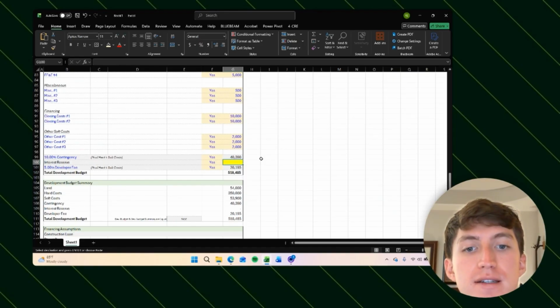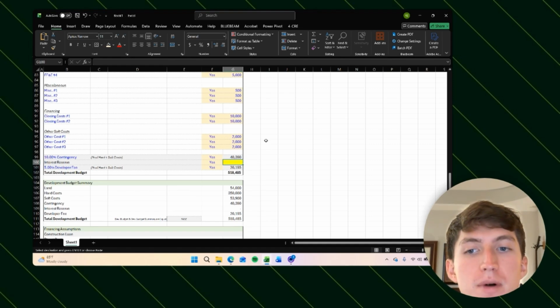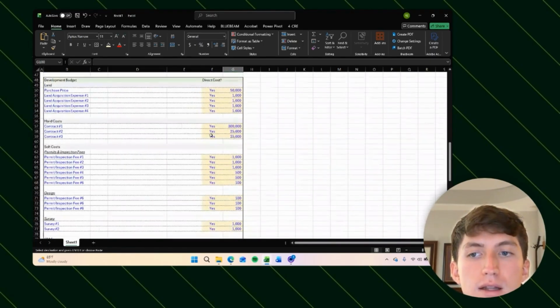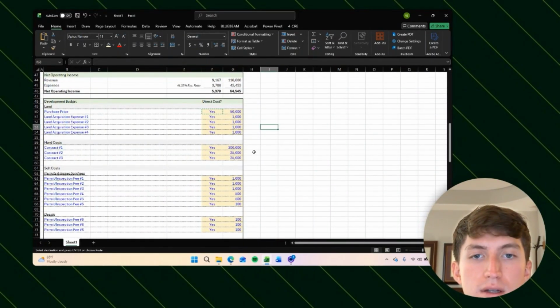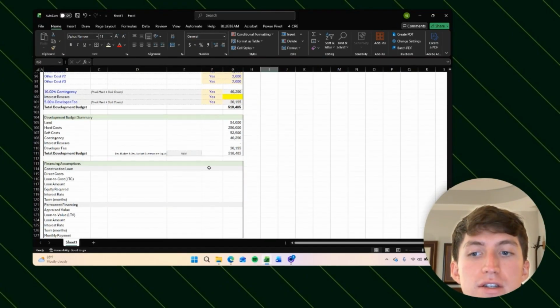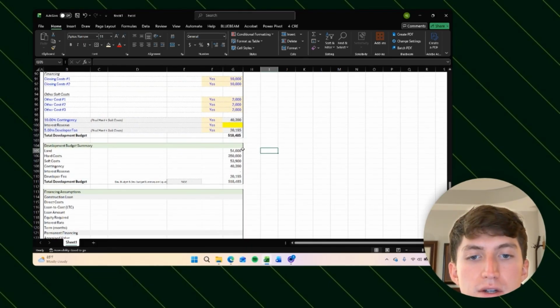Interest reserve is a separate account that you save. It's like a savings account to pay the interest that you're going to need to pay on the construction loan during construction. Because during construction, the project's not making any money. And so you need to set those dollars aside to pay interest when the project isn't making any money. That's your interest reserve account. But for residential loans, the amount of these dollars that are considered direct costs are going to be less, which is why we have this toggle.